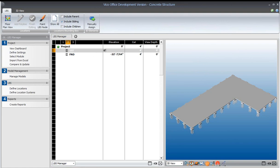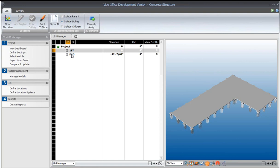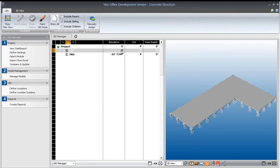I have the ability to add an elevation for the cut plane for that story. What we're now doing is splitting the project location into two vertical locations, two stories in the building. One of the stories is going to go from minus 22 feet to zero, and the other is going to go from zero to the top of the box.